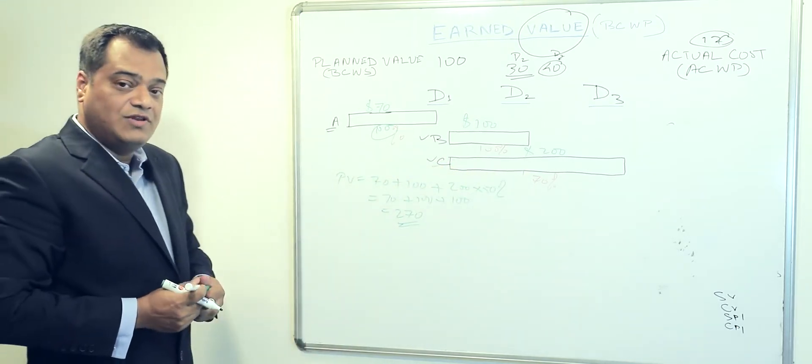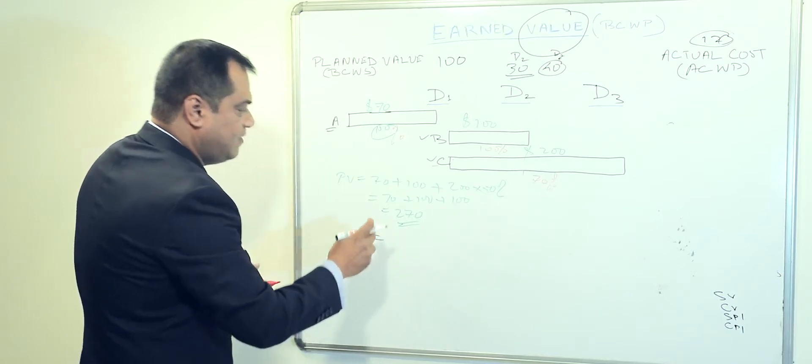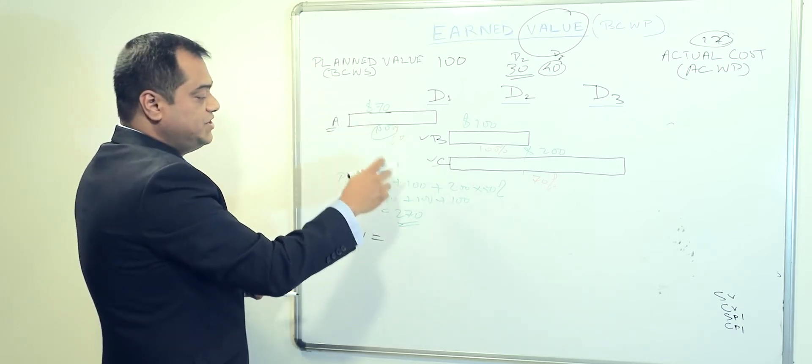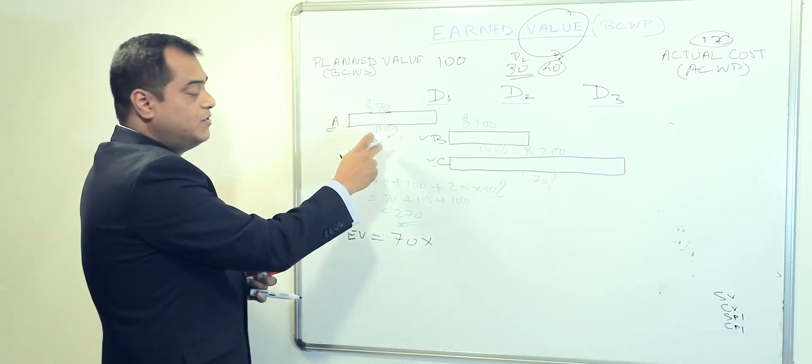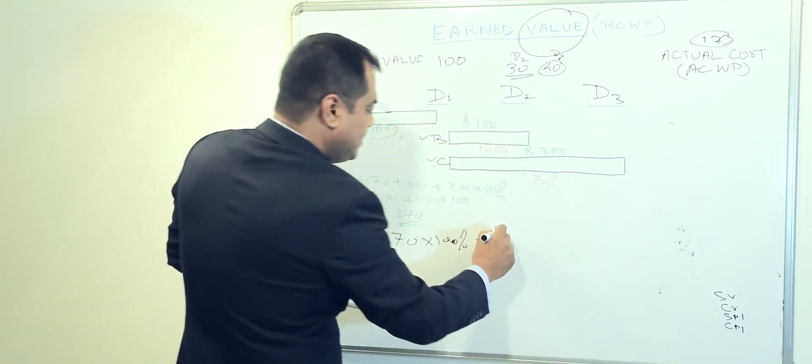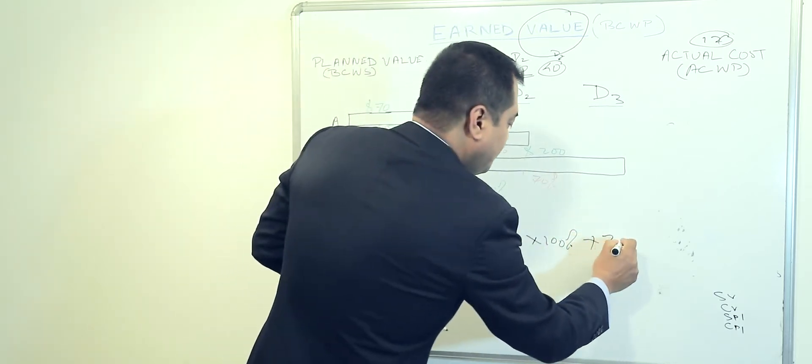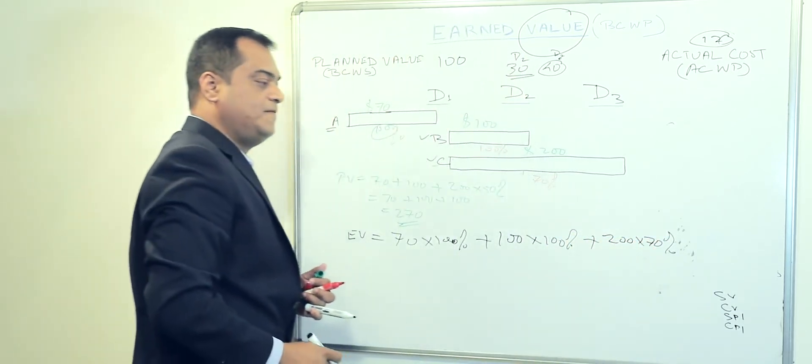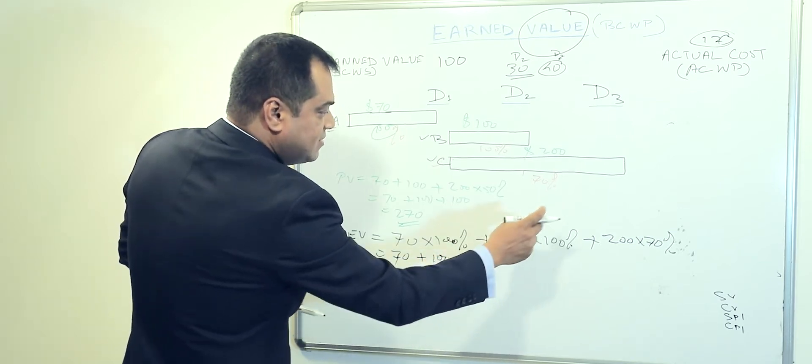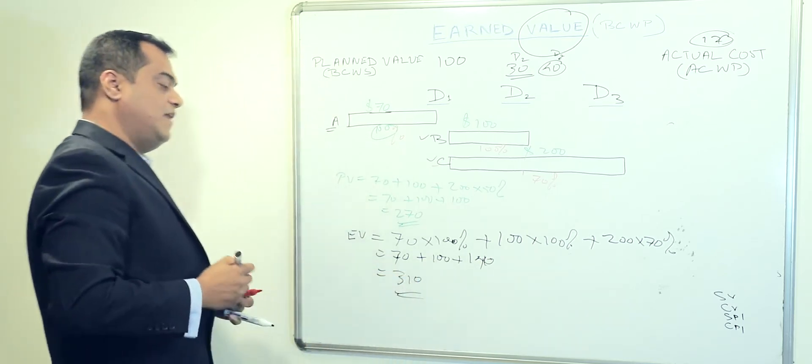So now let's measure earned value. It's quite simple. Like I said, if you have done exactly as per the plan, it's always going to be equal to plan. We just need to multiply the cost with the percentage progress. So now this is 100 percent, plus this also is completed 100 percent, plus now 200 is now 70 percent. As you can see, we end up with 70 plus 100 plus 140. That makes our earned value 310.